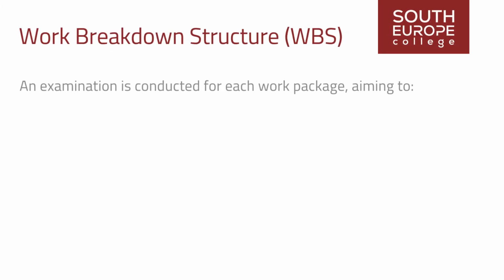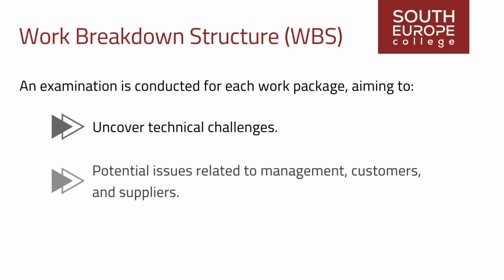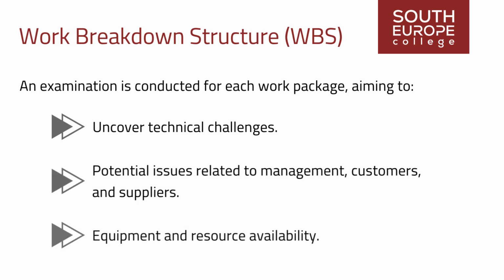A detailed examination is conducted for each work package, aiming to uncover technical challenges, potential issues related to management, customers, suppliers, as well as equipment and resource availability.